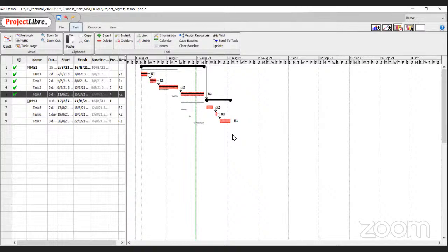Okay, this two-day delay here is going to lead to what kind of a delay for my endpoint, and am I going to get delayed? So this is how it brings in a tremendous amount of control, or at least it gives you clear visibility. You will know today if something is going to get delayed later on. It also gives you many, many possible things you can do. You may have buffers in subsequent activities, which you can consume and you can pull things back.